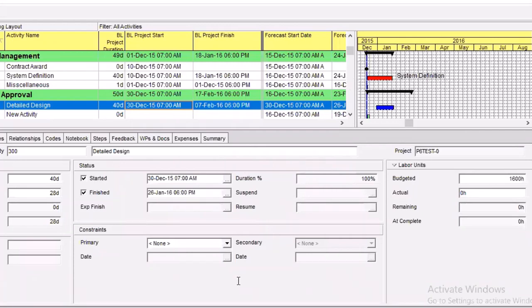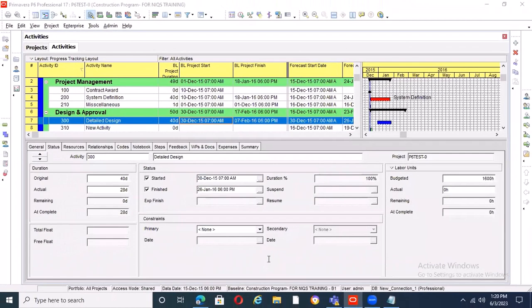Please, ma'am, permit. Okay, no. Ma, what will you do even if you advise on the cost implication of delay, and your MD said he has not been paid by the clients? In this case, it's very simple. You have advised your client. The cost implication will become your claims because the delay is coming from the client. You keep monitoring it and putting it down.